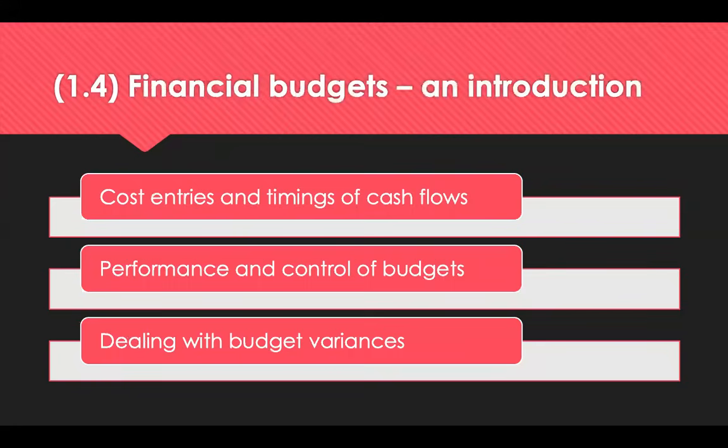To go back to the business case, the financial budget often manages a way of monitoring actual versus estimated costs. And that way, check what has been promised in the business plan in terms of cost versus benefits being achieved. But variances need not only be financial. It could be schedules, timescales, output or quality. And we tend to think of variance in terms of going over budget or estimates. We will certainly need to take corrective action, but positive variances could also be investigated.